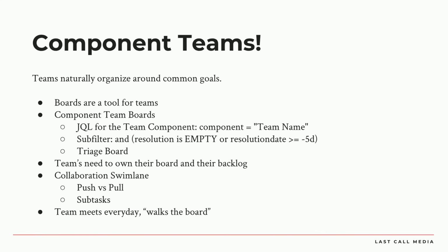I met with my development team, and we took the priorities and established timelines for them. Okay. So urgent meant 2 days, and then we went all the way down to you have 8 weeks to get something out. Sure. So once we all established what that was, that helped with wondering how long something was going to take. Right. And in your team, you came up with that, and that's an explicit way of working. That's great. That's how you want to do that.